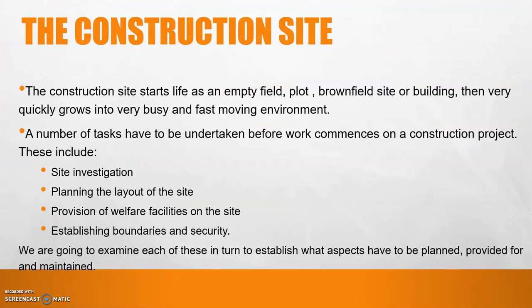I want you to imagine that it's your job to plan this building site. So at the moment it's an empty field, okay, and we have to do a number of tasks before we can commence work. So these include site investigation, so we're going to check the site. You know, it could be greenfield, it could be brownfield, it could be contaminated land, there could be old foundations and old basements. We need to plan the layout of the site. We need welfare facilities, and we need to make sure the boundaries and security is maintained.